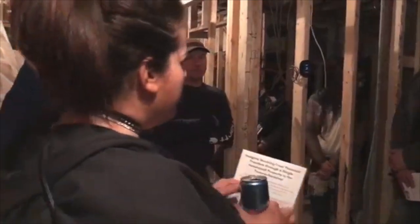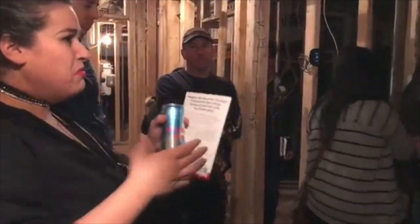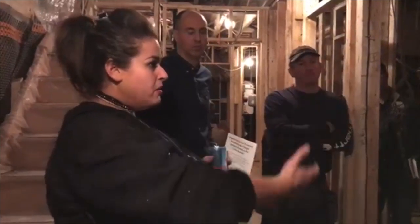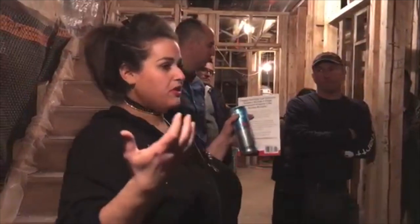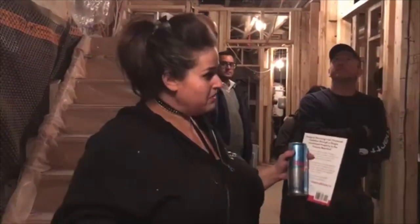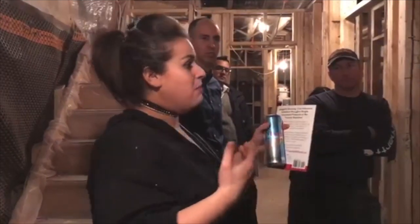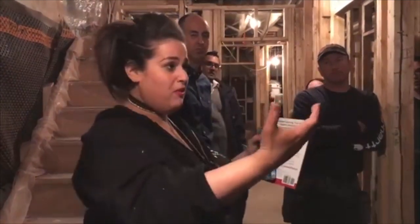Yeah, absolutely. So the process for underpinning a basement, when you're underpinning a semi, the first stage is requesting permission from your neighbor to underpin what's considered a party wall. If they don't give you permission, it doesn't mean that you can't lower the basement, it just means your options on the party wall are going to change slightly, which means you may have to do a bench. Nobody wants to do a bench in Toronto homes because they're very narrow.